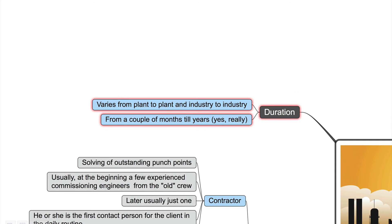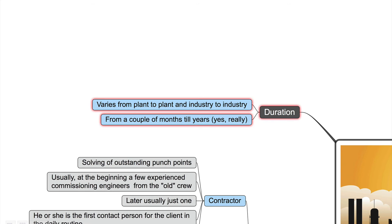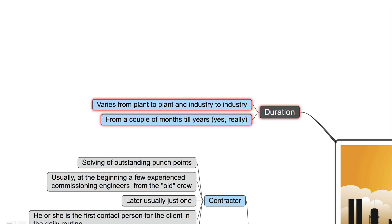The duration of the post-commissioning varies as well from plant to plant and industry to industry. Maybe this is just one or two months, but it can go as well for a few years. Yeah, this is really true. I know a colleague and I worked in a petrochemical plant in Arabia. And after the plant has been handed over, my colleague stayed there for more than two years to solve the last remaining punch point.